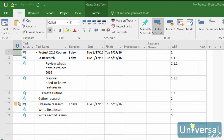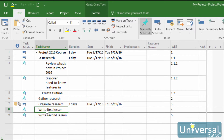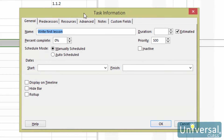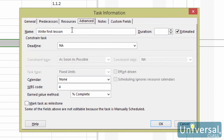To set a task type, double click a task to see the Task Information dialog box, then click on the Advanced tab. Now you can select the task type in the Task Type field. You can only assign task types to auto scheduled tasks. If you have a parent task followed by sub tasks, you can assign the task types to the sub tasks.